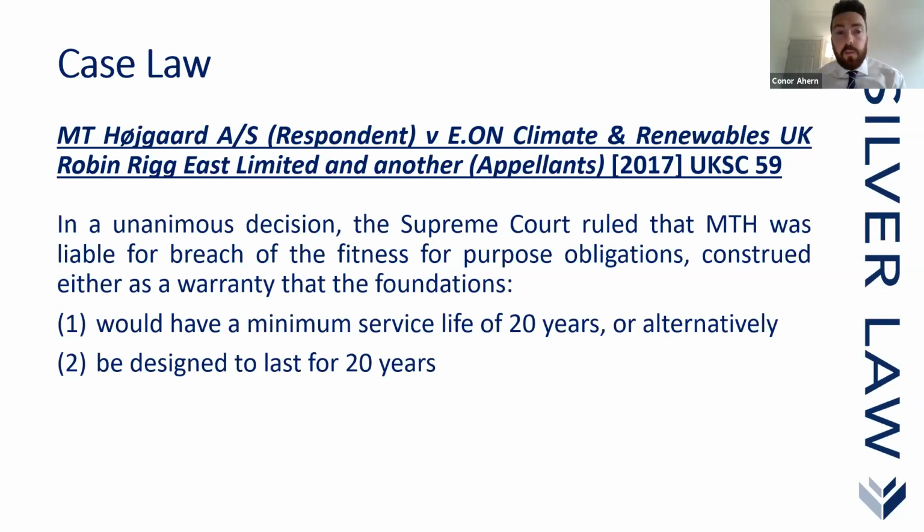So in this case, MT Hogarth were the contractor. They were basically building wind turbines, actually, and a clause in the specification said that the wind turbines, when completed, would have a minimum service life for 20 years. They built the turbines, but obviously they failed before the 20-year cycle expired, and basically that was considered to be akin to a fitness for purpose obligation by the court.